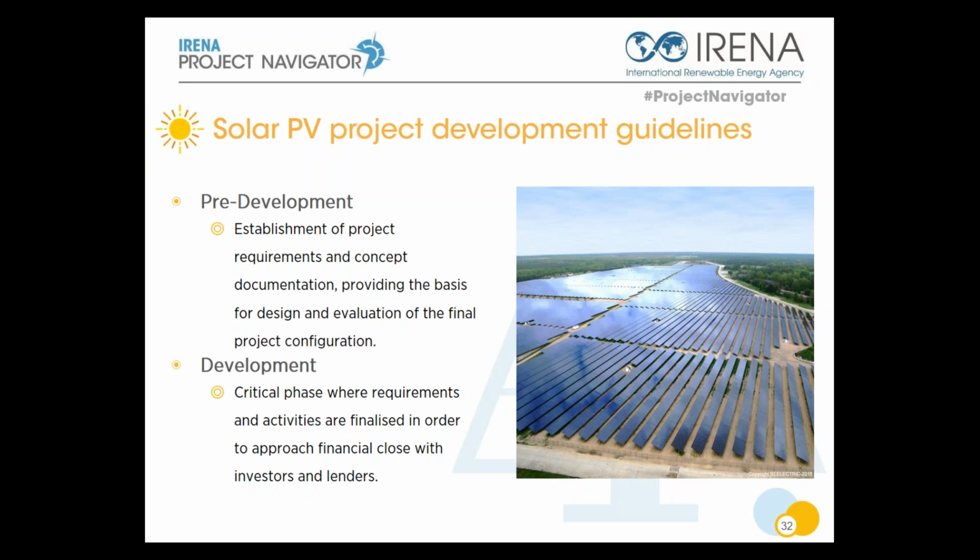degradation. So here we're also providing information about physical factors that will impact, at the end, the guarantees or the discussion you will have with module suppliers to negotiate your guarantees, because in the end the models will depend also on this information. So you will find a lot of information about monocrystalline, polycrystalline, thin film, and different degradation curves.